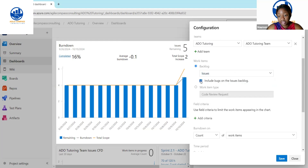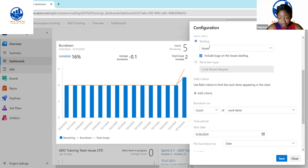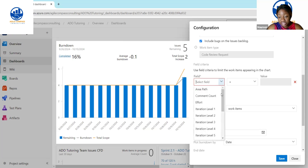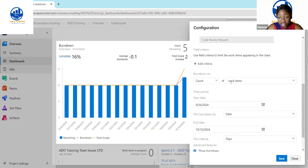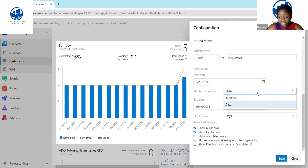We want to track all the issues under this board. If you have specific criteria you want to see on the burndown chart, you can click Add and select the field — maybe effort, area path, or iterations. We don't need anything extra, so we'll close that. We want to burn down on count of work items. When it comes to the time period, since this is a sprint burndown, we want to leave it as the start and end of the sprint. You can also select specific dates if needed.